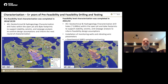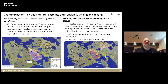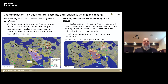Springpool is a very well characterized site, with early geotechnical and hydrogeologic drilling and testing dating as far back as 2005. Key aspects of the pre-feasibility and feasibility study characterization work are highlighted here — 40-plus geotechnical and hydrogeologic drill holes within the open pit and dyke footprints to support stability, seismic, and seepage analysis, confirming design assumptions. During the feasibility study characterization in 2021–22, another 45-plus holes covering about 5,000 meters were drilled within the open pit and dyke footprints to further inform the design. The project is well positioned to complete feasibility-level designs along with the finalization of the environmental assessment in 2023 and 2024.